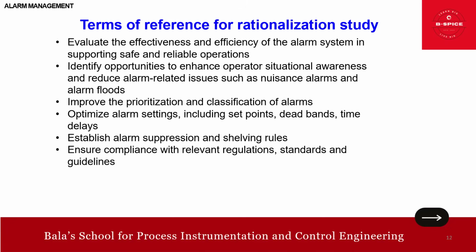Basically, friends, the alarm rationalization study will adopt a systematic and collaborative approach, starting from data collection, alarm rationalization session, creating a database, and coming out with the report and identifying the recommended actions. So you have to put everything in your terms of reference if you want to give this assignment to your vendor.